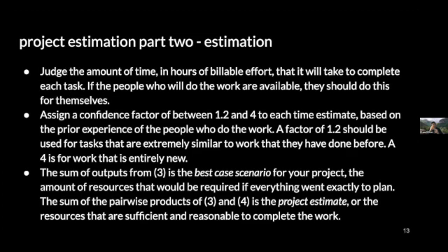So if you have a number of, say you have 100 hours and the average fully loaded with IDC and fringe and all of those things, if the average fully loaded cost per hour of people in your organization is say $250, then the minimum possible amount of money that this project could cost is $25,000.